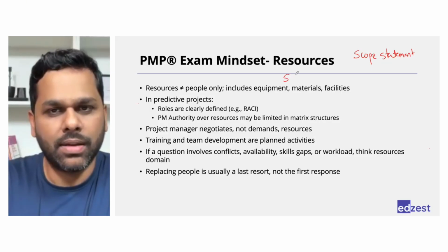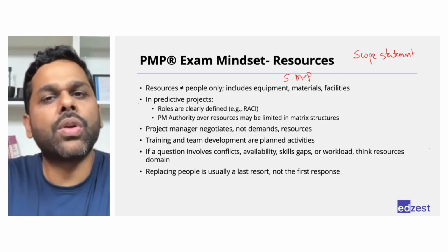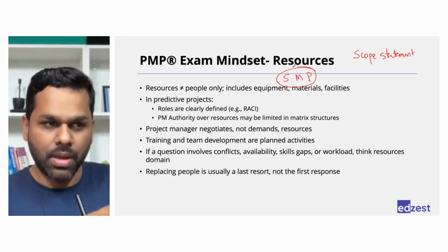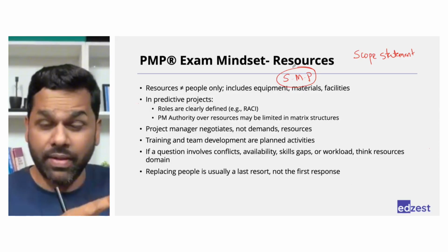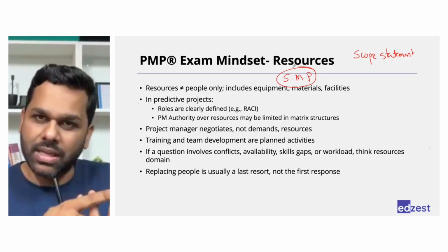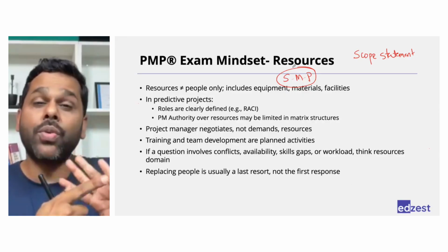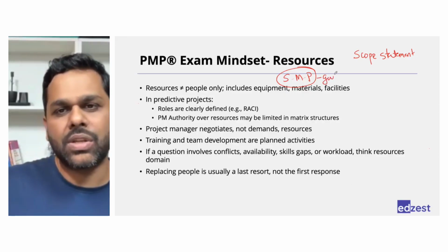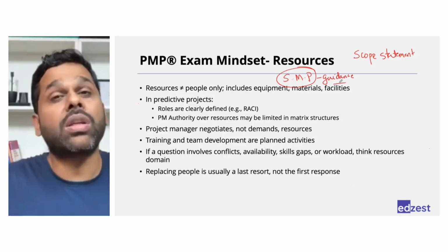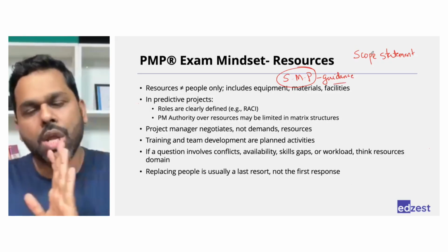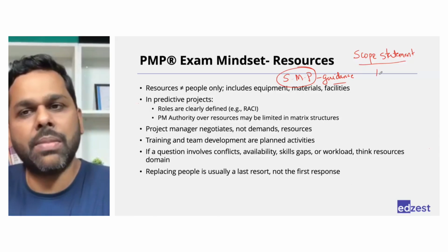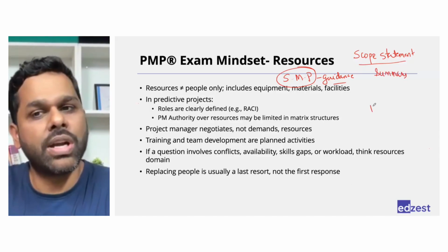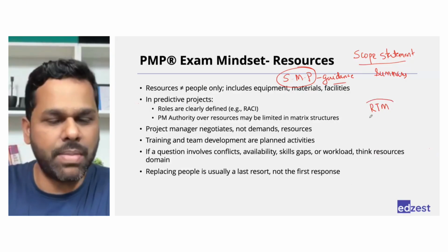Okay, these are two different things. Scope management plan will tell you how you are going to manage the scope, which means how you will identify the scope, how you will identify the requirements, how you will summarize it, where you will mention it, how you will discuss it. Right. So scope management plan is basically the guidance. It does not contain information on what the requirements are. Scope statement is a summary of all the requirements that you have noted down in something called the requirement traceability matrix.